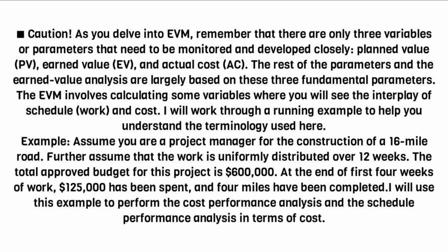Caution! As you delve into EVM, remember that there are only three variables or parameters that need to be monitored and developed closely: planned value, PV, earned value, EV, and actual cost, AC. The rest of the parameters and the earned value analysis are largely based on these three fundamental parameters. The EVM involves calculating some variables where you will see the interplay of schedule, work, and cost. I will work through a running example to help you understand the terminology used here.